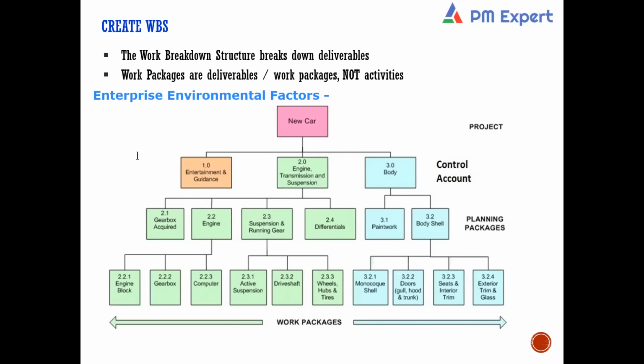Because whatever work you are going to do in a project should be part of the work breakdown structure. Should there be a separate component at the first layer itself? Yes. Why? Because there will be effort consumed in that, and there will be cost consumed in that also. This is something that many times people miss.